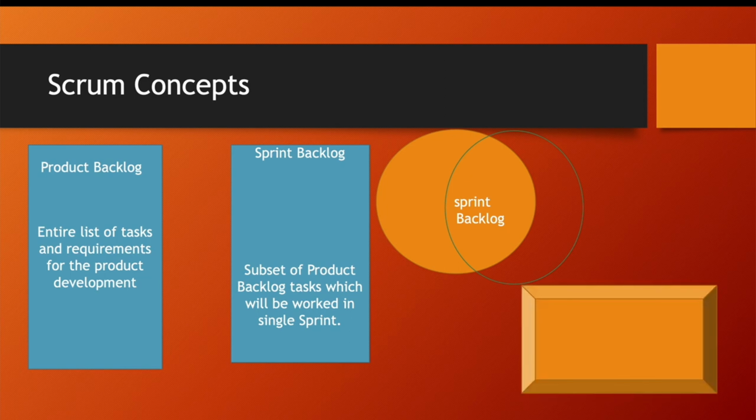Okay. In the Scrum framework, we follow a few guidelines like the daily stand-up call. It is kind of a daily call with the team for at least 15 minutes about the update on tasks or any blockers if they have. And then the next is sprint planning, in which we decide the tasks for one sprint backlog and the overall timeline for completing that sprint. And the next is sprint review, where the product owner will be reviewing the completed task and closing the task on the JIRA board.